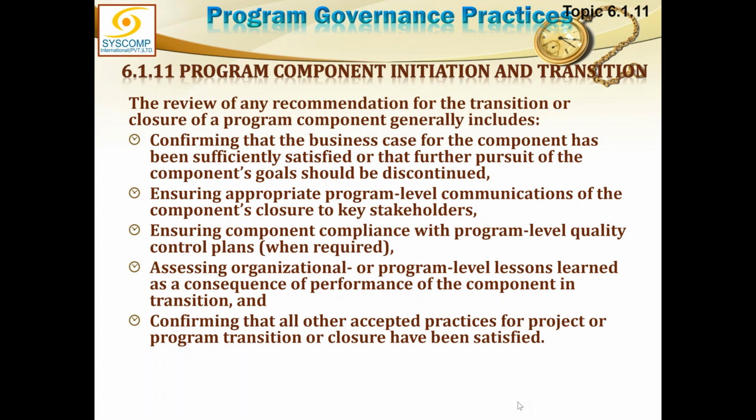Ensuring component compliance with the program level quality control plans when required. Assessing organizational or program level lessons learned as a consequence of performance of the component in transition. So all the lessons learned or the knowledge base created from the project will come to program, and they may affect the program level lessons learned or may be transferred to the organizational level lessons learned.